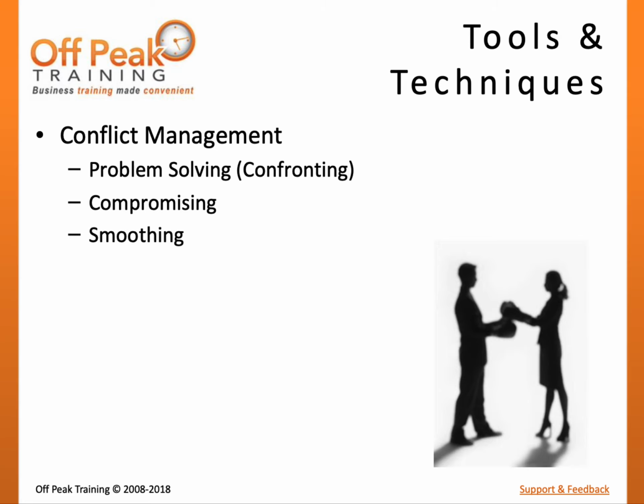A less preferable technique is smoothing. In smoothing, the manager tries to alleviate the worry rather than the conflict. Since a resolution is not actually reached, this is referred to as a lose-yield situation.